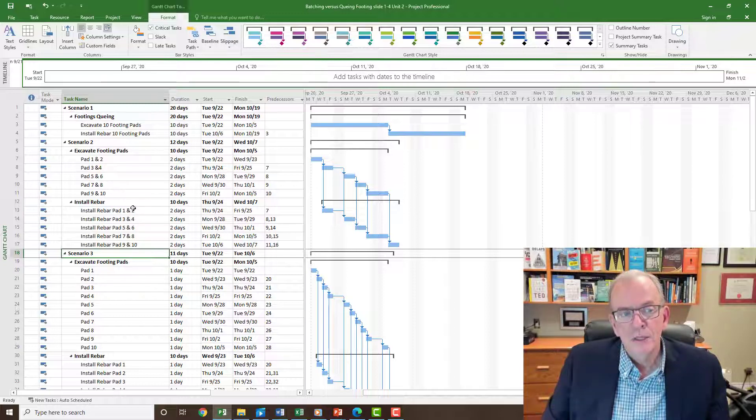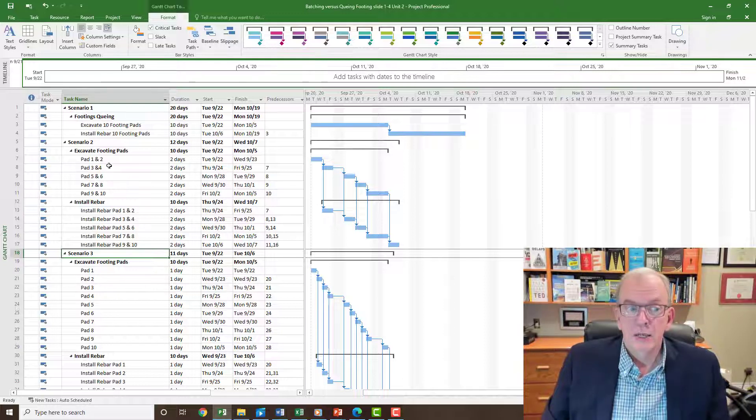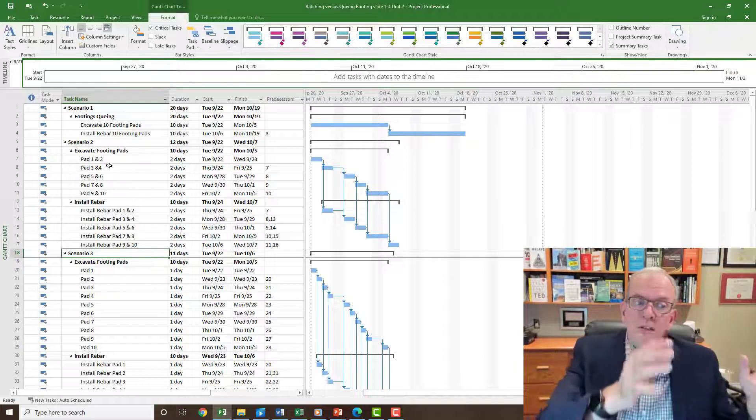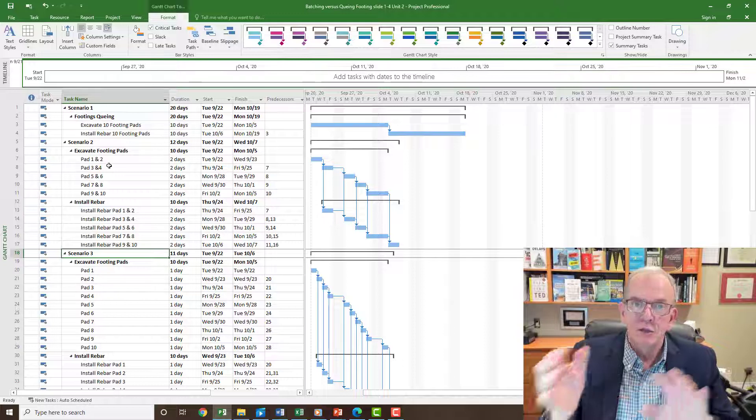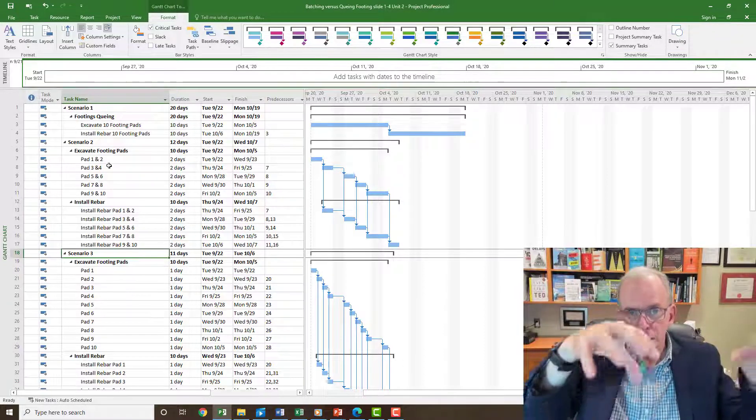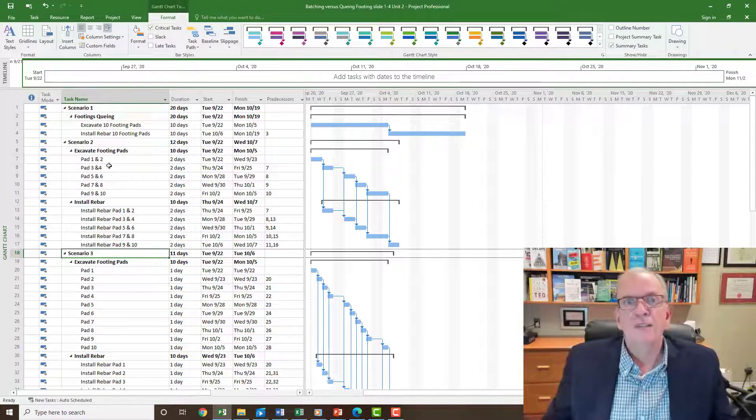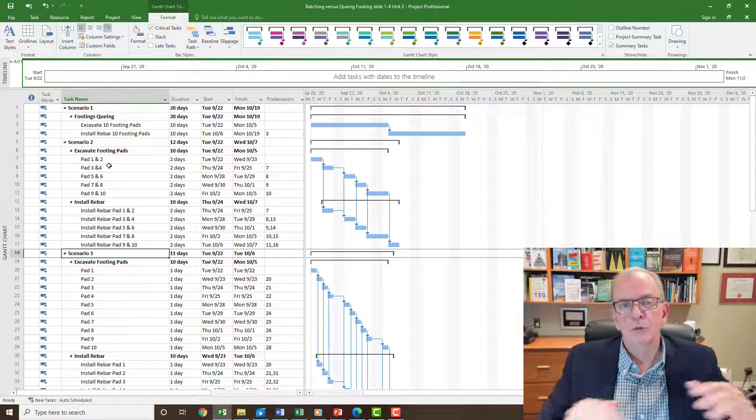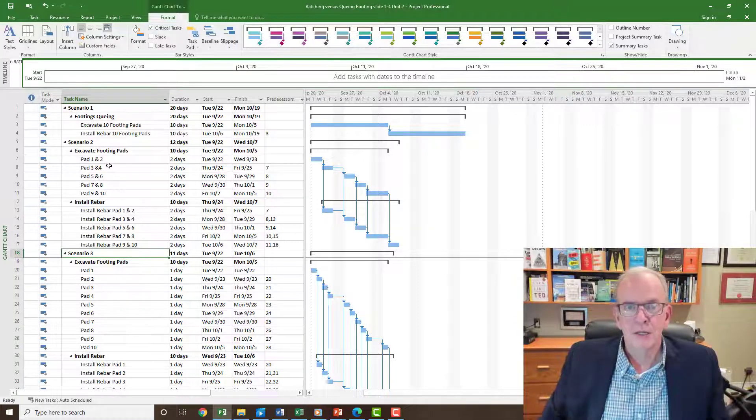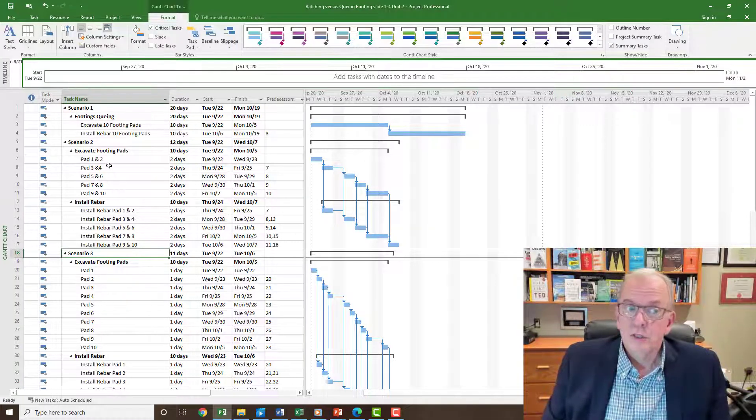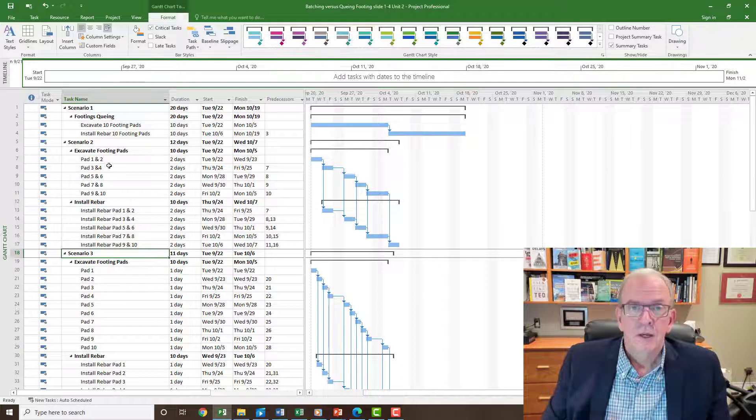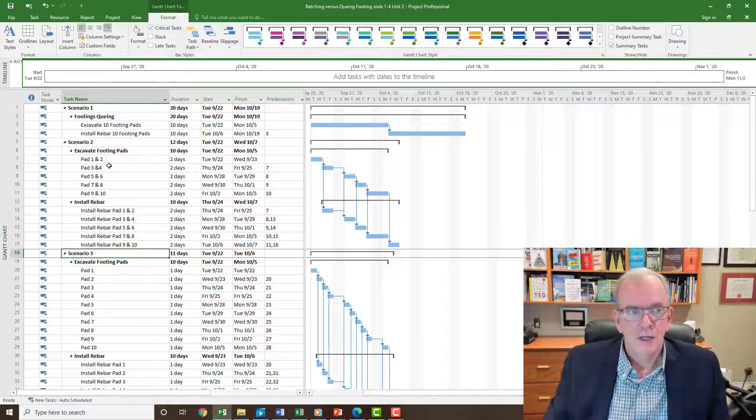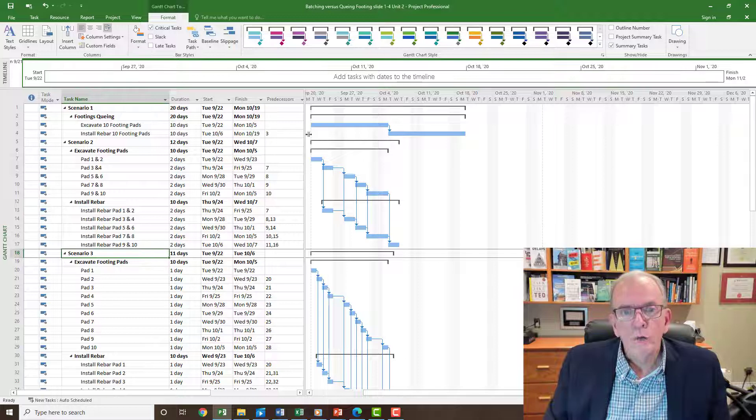But you have to rationalize, how much space do I have? Do we have room for the excavating equipment in here to do two pads per day? In other words, while the excavator is excavating the next two pads, do we have room for the rebar installer to be installing it there in a safe manner? So is there that capacity of space? And if we do, well this is making a lot more sense.